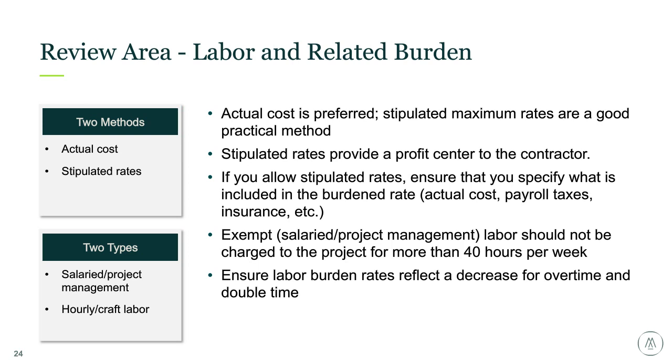And some other areas to look out for: project management labor, and this is just a recent example that we came across, so wanted to share it with you guys. Project management labor is typically salaried, so limiting the hours worked to 40 hours can prevent front loading of hours on holiday weeks like Christmas or Thanksgiving.